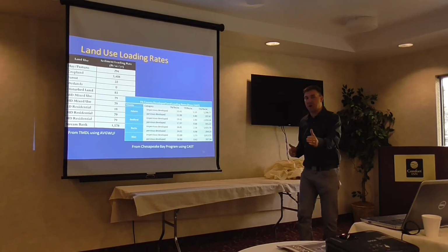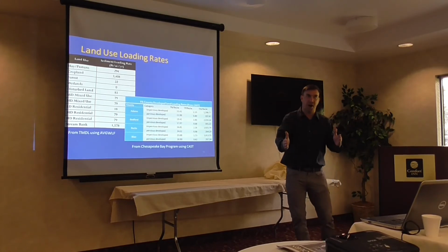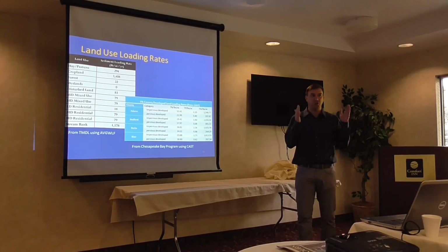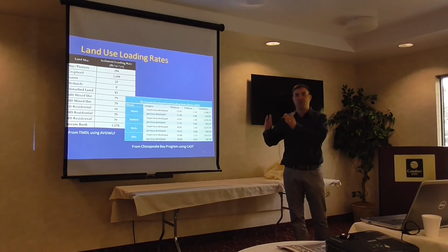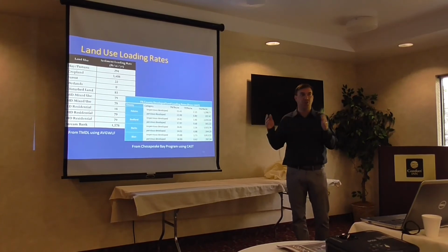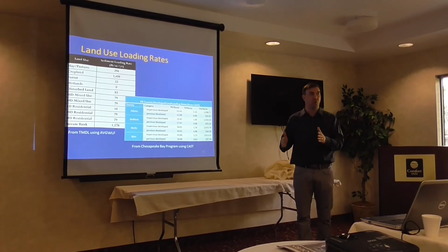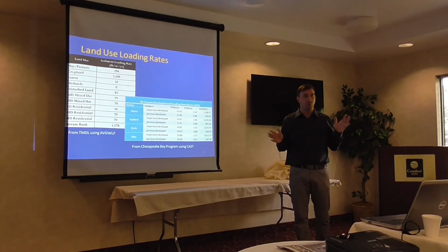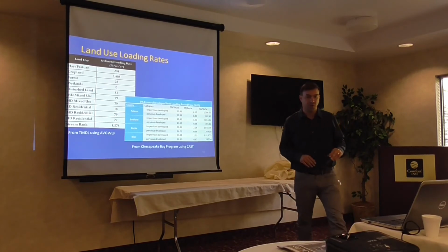So if you use one model to do current loads, you use the same model to demonstrate that you've achieved your benefit. So it doesn't matter which one you use, just be consistent so you can document that percent load reduction. They don't actually care about the actual loads, it's the percent load reduction, because your loads are going to be different depending on which technique you use. So keep that in mind.